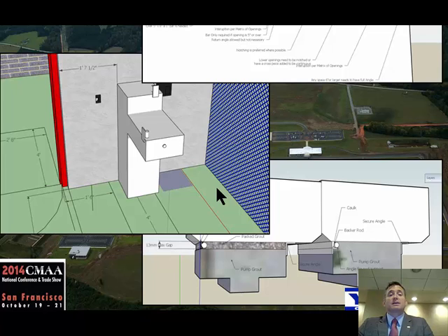And so what we did is we just used kind of a lower level of BIM. Right? I just whipped out SketchUp. And whenever we needed that higher level of visualization, we just created it specific in that instance. Because the investment to try to push that through might have eliminated the profit on the project.